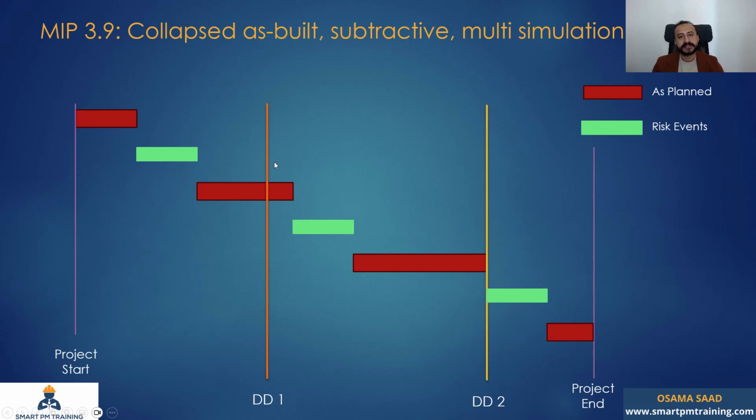The problem here is you will often need to redo the exercise more than once. Why? Because in many cases the logic will not be perfect. You think it is perfect, but sometimes you miss predecessors. The logic will not be 100% accurate. Sometimes when you do the analysis in this window, the outcome is not really practical, like there is wrong logic, something that needs to be fixed, because everything is based on after-the-fact logic. It is not natural. You have the facts, but you introduce the logic based on these facts. It's the other way around.